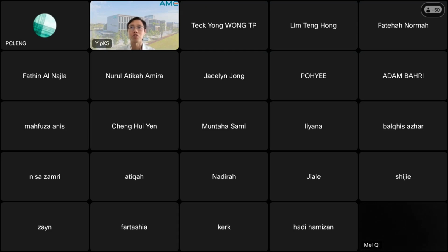Probably you can save like 5 clashes. For one clash I need to hack, redo, and that's 2,000 per clash. Five clashes identified and solved, and I can save 10,000. But I need to spend on one modeler, one supercomputer, sending the modeler for training, buying the software. Maybe I need to invest 100K in order to get a cost saving of 10K. So from a business point of view, it is more challenging. That's why not all players are ready to make such an investment.